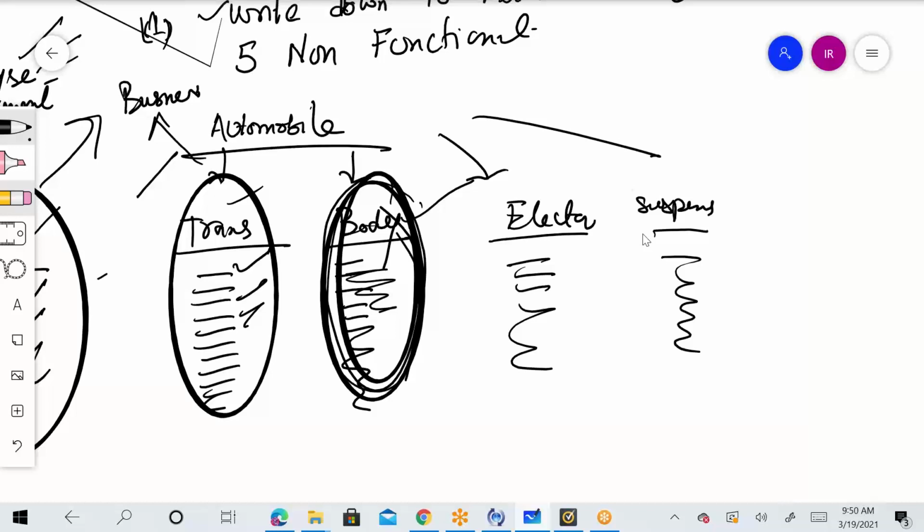So one major reason for making change is that if I'm doing a project, down the line in 3, 4, 5 months, some regulation may change, and that application gets impacted because it is specifically designed to meet those regulatory guidelines. So if that application is going to be impacted, I should have the flexibility to make adjustments. So agile methodology or the iterative approach is mainly used for those designs and platforms where changes can come in where you don't have any control.